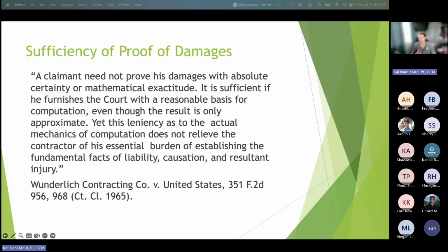You've taken my ability to do, maybe I could have just taken that out of scope and had some other maintenance contractor do it. Because I think the concrete, and obviously Ben and Danilo know more, but I think it was part of the channel lining that was required. And so it's, oh, well, it had to happen because it was design. I don't know that. It's too late for me to investigate it because it's already done, but I didn't know it was going to cost 6 times what we put in our unilateral change. That's why I kind of feel like we're on solid ground, because we gave them a unilateral change.